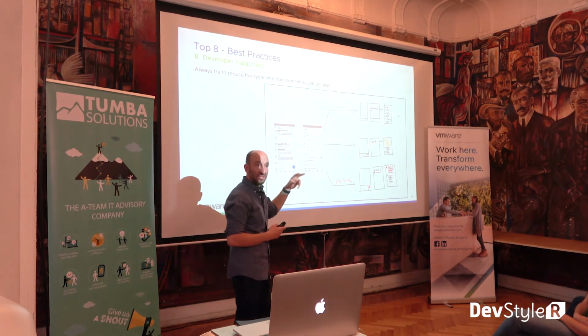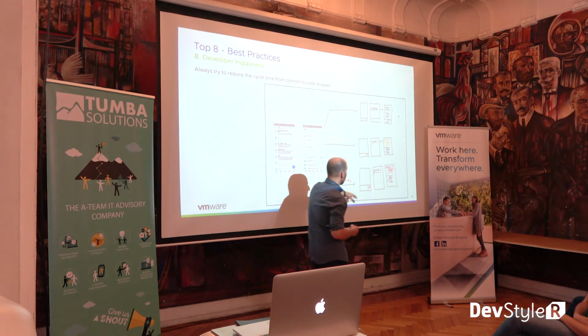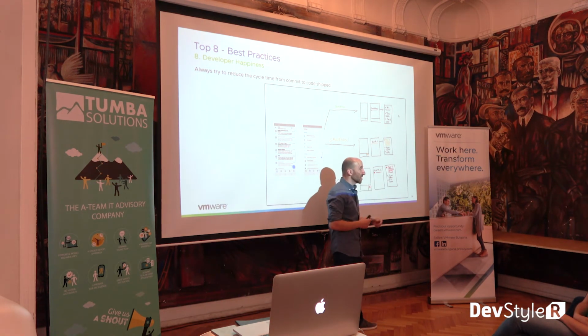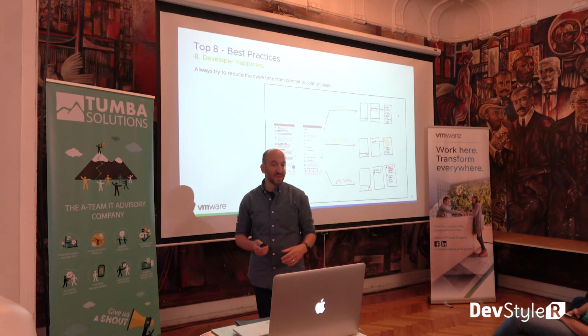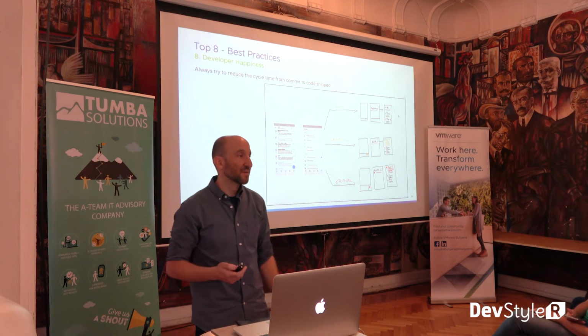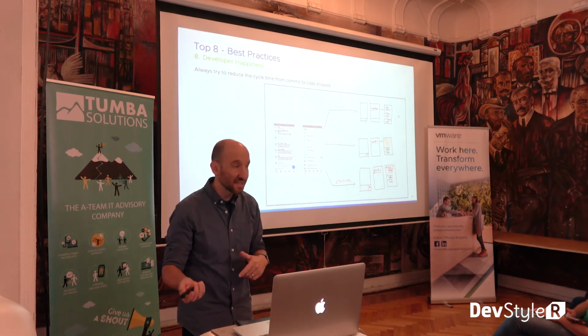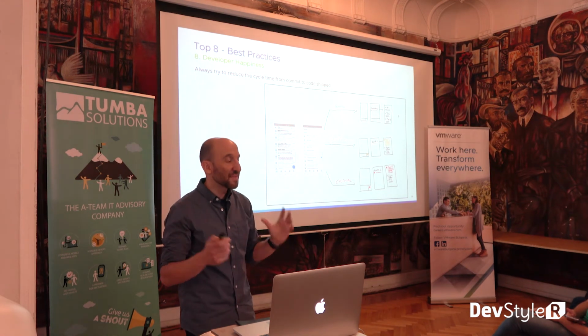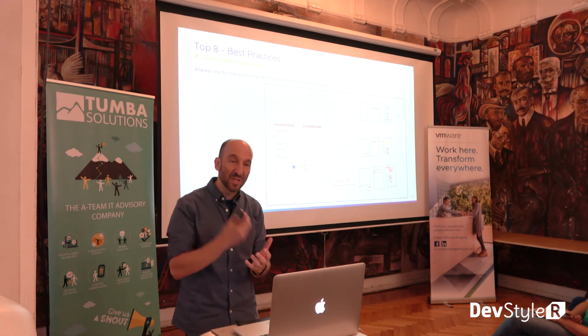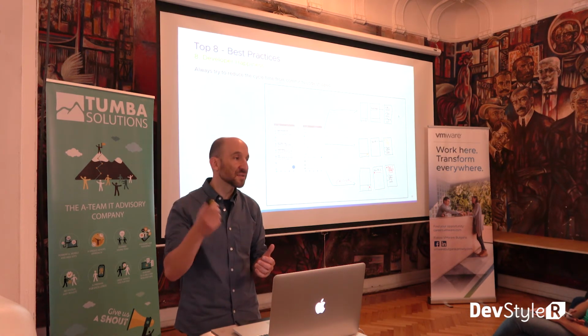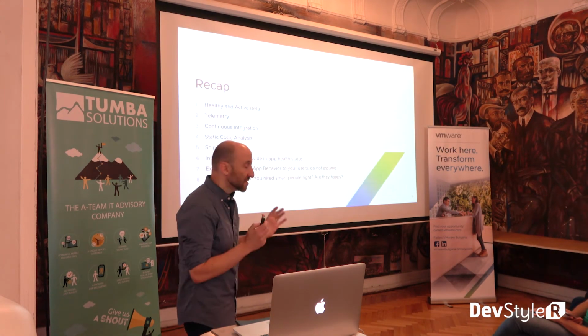The development team started on it, 2 developers on each platform. We're right at the back end, we knew what the UI was going to look like, more or less. So we start building those classes. And then as we get the elements and the assets from the UI team, we're plugging them in, and the feature shipped. So from that to shipping a feature that you can test, in a week. And that makes everybody happy, right? It's nice to see your code go from when you merge it in to production. You don't have to wait months until your code's out in the field.